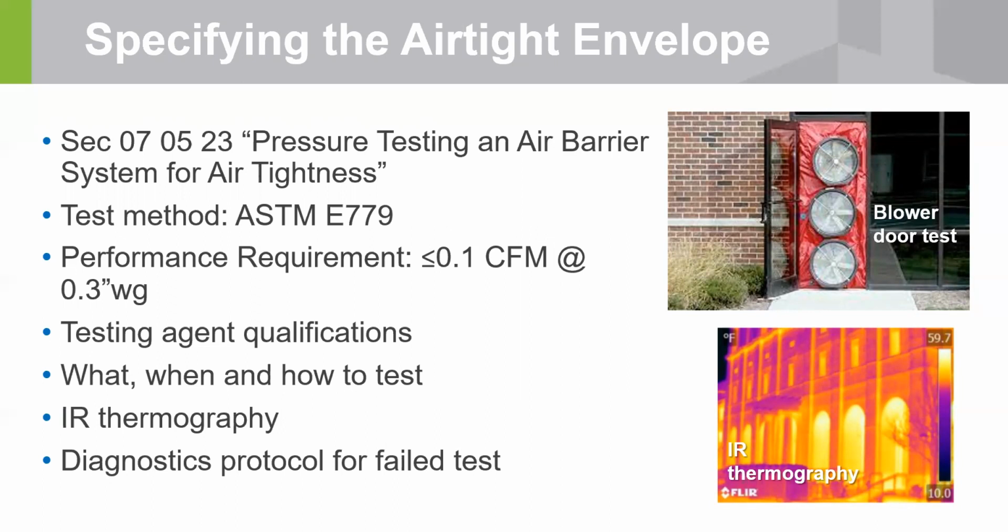So the installer that we worked with, Alpha Insulation Waterproofing, they were savvy enough to know that they did not want this building to fail the test after it was fully constructed. It's very difficult and expensive to make repairs after the fact. So the strategy was to really get on this during construction and make sure that this building wouldn't fail this test.